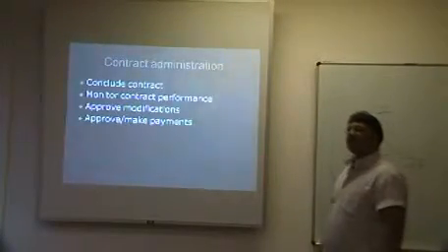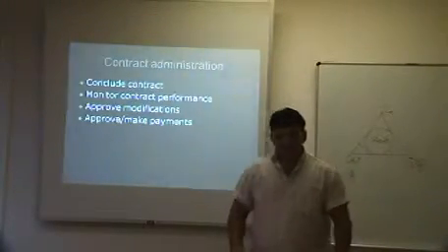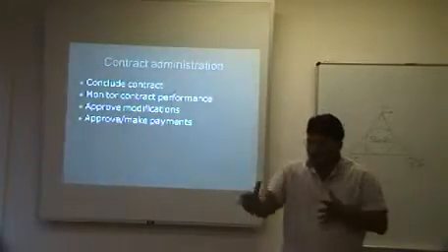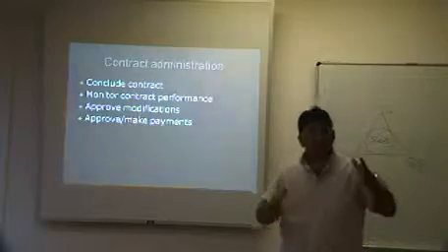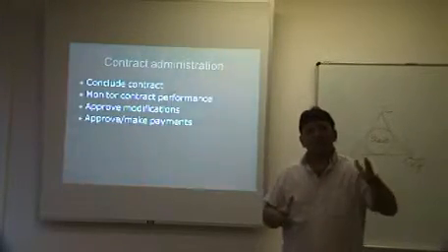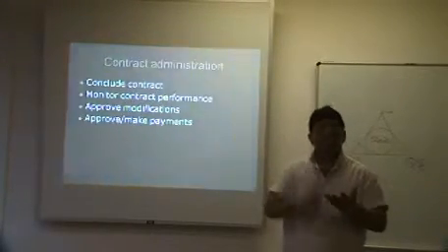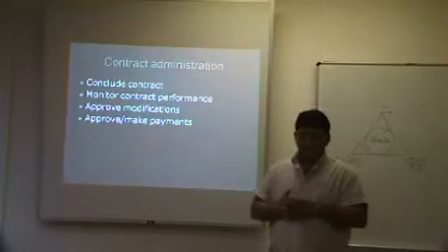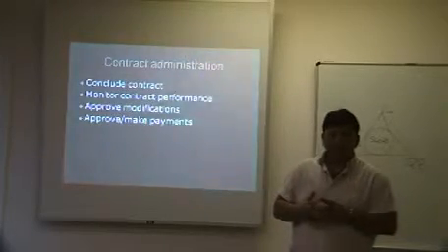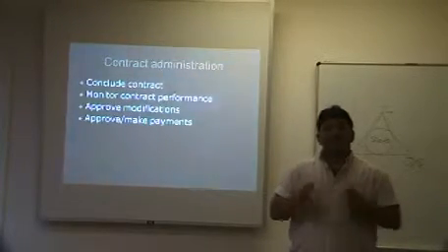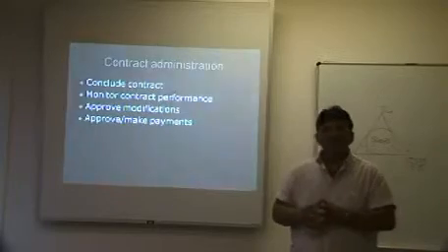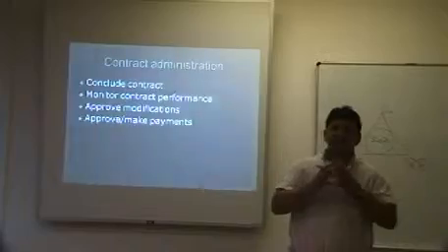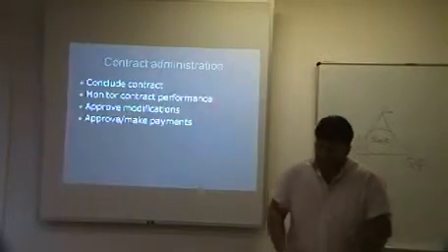Well, if the supplier is appointed, there's a contract that comes into being. They negotiate the contract in terms of price, and they might negotiate in terms of clauses and terms and conditions of the contract, which is also very important. A simple term and condition is that work hours will be from 8 to 5, and it will be a 5/7 or 24/7. It depends on the type of contract, etc.